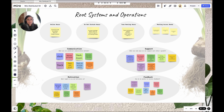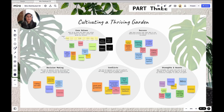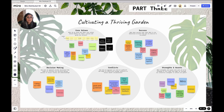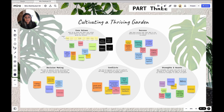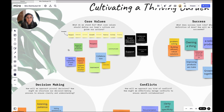Let's move to part three: Cultivating a Thriving Garden. This is where you'll spend most of your time — about 30 minutes, more if you have it. I usually start by introducing each section and the questions below it, then ask everyone to grab their sticky color and set a timer for about five to seven minutes depending on the size of your team. I ask everyone to fill out as many stickies as possible for each bubble. Once the timer is up, I ask for a few volunteers to help me affinity-map themes — then the real magic happens and the discussion starts.